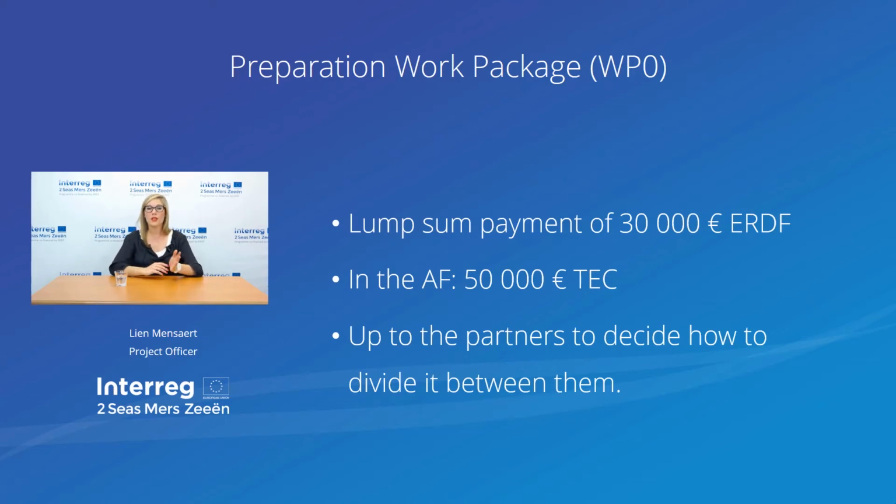It is up to the partners to decide how you will distribute these €30,000 ERDF. For example, if a lead partner did the majority of the work, then the partnership can decide that the lead partner will also get the majority of the lump sum. If all of the partners contributed equally, then the budget can also be distributed equally.